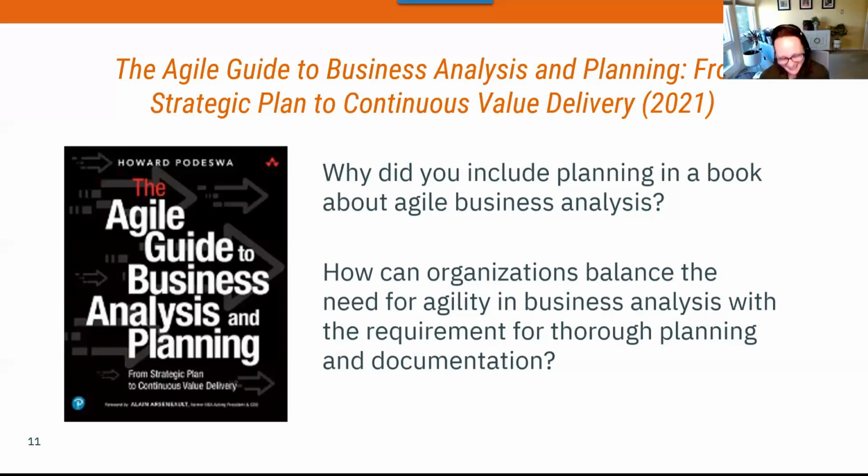So let's say, first of all, yes, we do plan in agile. If you're a Scrum person, you're at least going to be doing sprint planning. If you're an XP person, extreme programming, you're also going to be doing release planning. If you're just any regular person, you're probably doing that anyway, or quarterly planning. And certainly there's a degree of planning that happens every single day when you meet for your daily Scrum. So it's wrong to say that agile and planning don't mix. They do, but the nature of the planning differs. So I guess that's the first thing.